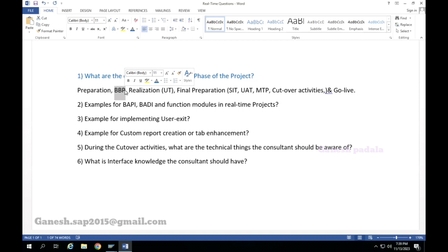In UAT time, if you get 10 more new developments, then the consulting team will ask for extra payment. They will say, we are still at UAT, so you have to do it in the earlier agreement. These kinds of things happen. If it is at production stage, it is even more complex. Their budget, everything is frozen at that point of time, and you are going to request new changes.